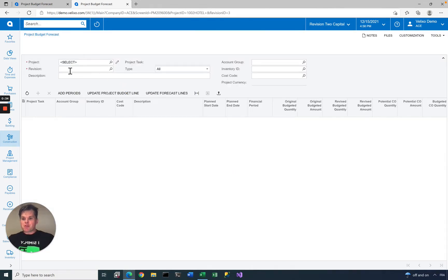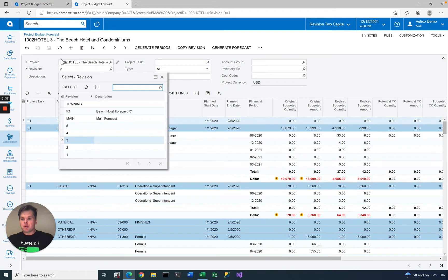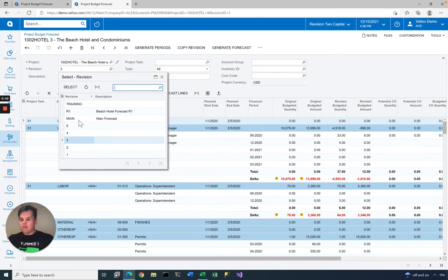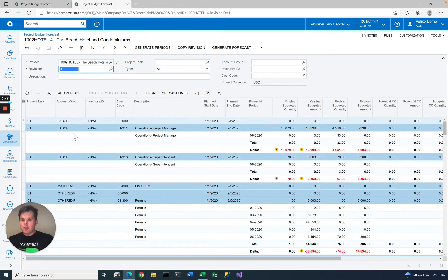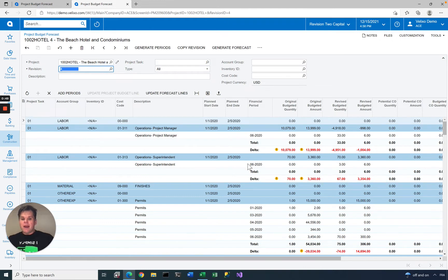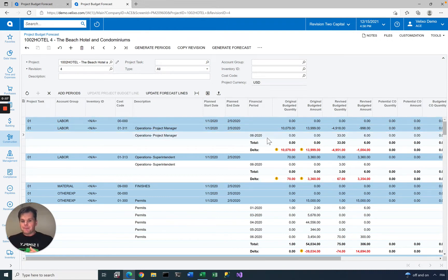This will bring up a screen that lets you look at all the different forecast revisions for the selected project. As you can see, I have about eight different forecasts for this project. For each forecast, you will see a set of rows showing the quantity and the amount for each task, account group, inventory item, cost code, and financial period.